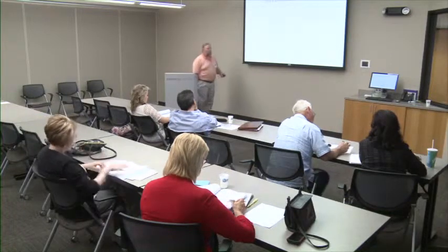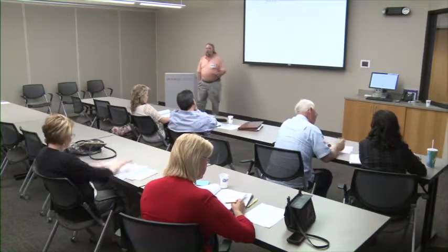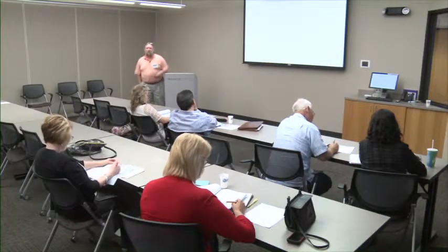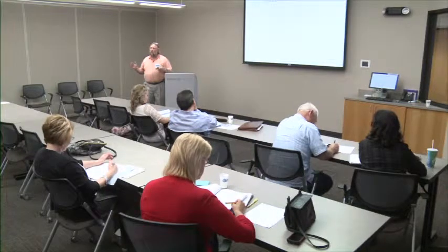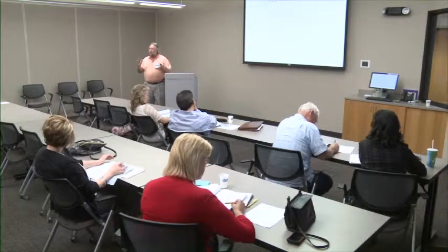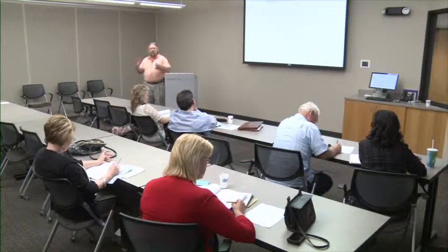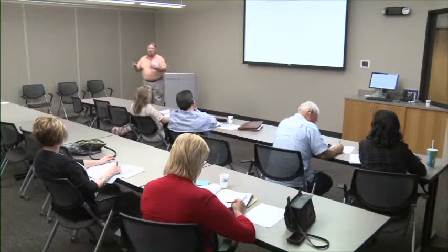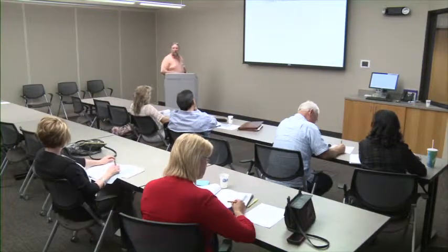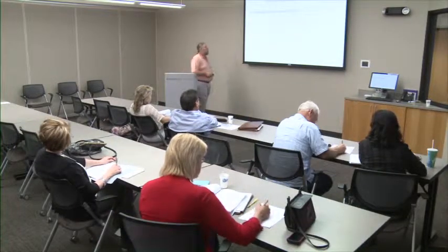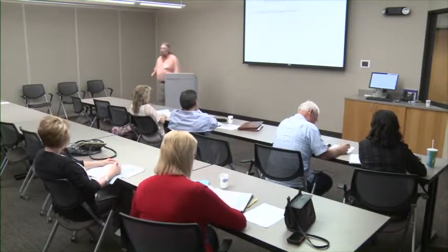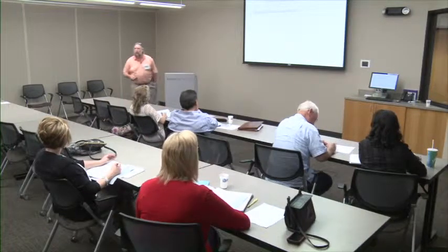Now, let's look at short interval scheduling. Sometimes we put together schedules on a weekly basis or a monthly basis. So we have this long schedule, but there are times when we're looking at our schedule and something's going wrong, and to get us back on schedule, we may have to do a short interval schedule where we're going to come in and change the schedule so that we can correct something to make us get back to where we belong. Okay? Again, plan the day-to-day work in this short period of time. We may adjust the days and say we're going to 10-hour days for the next 2 weeks, guys, because we've got to catch up.